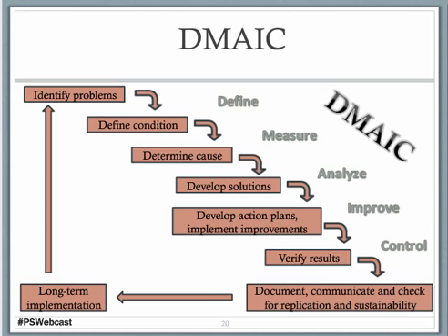Where we have problems in our structured approach using a deployment platform is we have difficulty in defining the problem. Because typically what happens is we see a problem, and all of a sudden the problem becomes so large it goes beyond what our initial scope was, and we define it then as project creep. The project becomes so big, or the problem becomes so big, that we can't fix it. So the idea here is to define and to focus in on a small win-win, a small area, and focus on how you can measure that, analyze it, improve it, and then control.